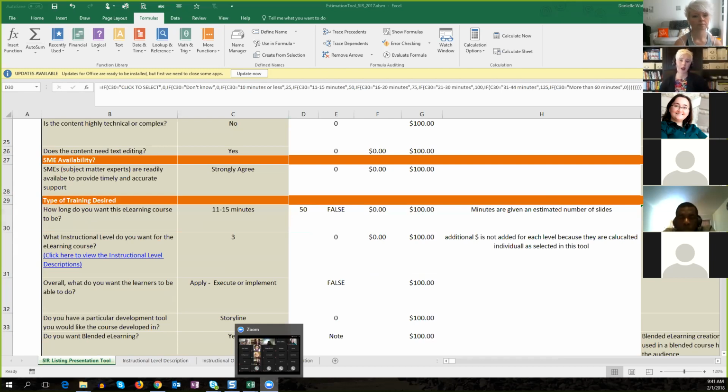And then we're able to see, okay, of this 86 hours, 30 of them should be spent in storyboarding, because we kind of know percentage-wise how much we spend in storyboard, how much we spend in alpha, how much we spend in beta, and so on. And sometimes we'll spend more time on the storyboard. Let's say we spend 40 of those hours, but we don't mind creating a storyboard on steroids, is what I call it, where it has a little more function. It's probably between a storyboard and an alpha. It just means we're not going to have to do it in the alpha.